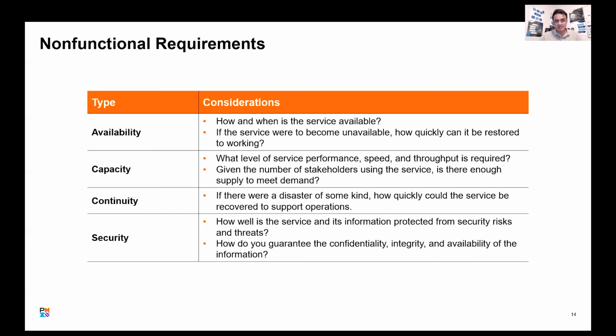You don't just assume, hoping the government will allow it. For example, government regulation says the thickness of the wall should be 4.69 plus or minus 5% variation, and based on that you make your assumption. But in a project plan, you don't assume things without any data backing, just to be very clear.